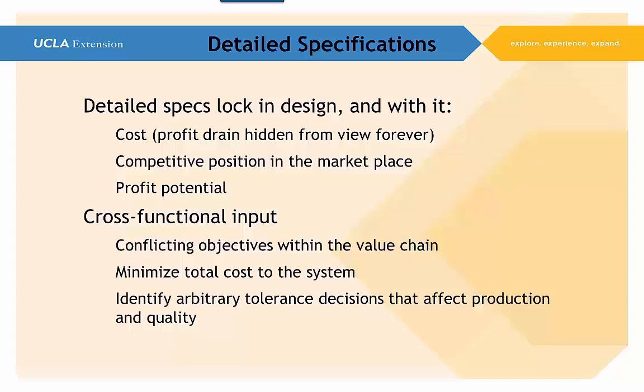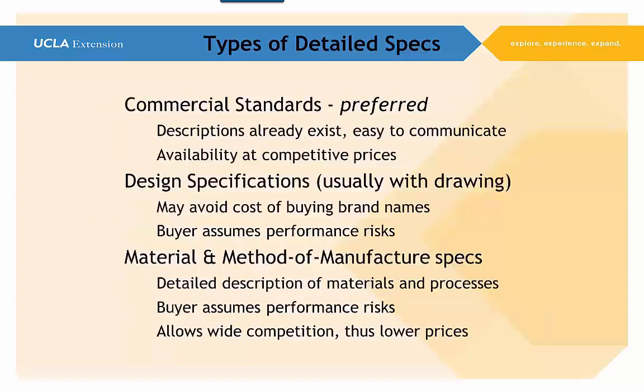However, if we were to say that the screen has got to change and respond within a quarter of a second or a tenth of a second, that might be absolutely way too tight, and that's going to be a high performance specification, so you know that's going to cost money to make sure our system will respond in that type of time frame. So when we talk about these detailed specs, we can look at what kind of standards we want to use or how we want to write the specifications.